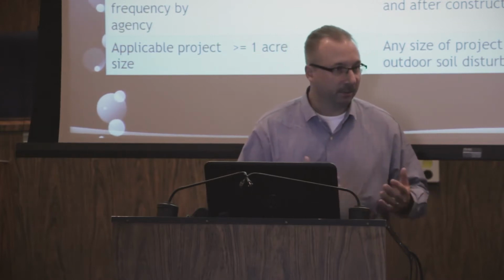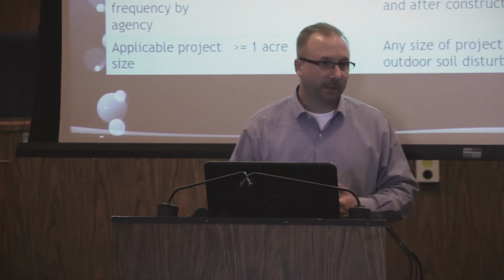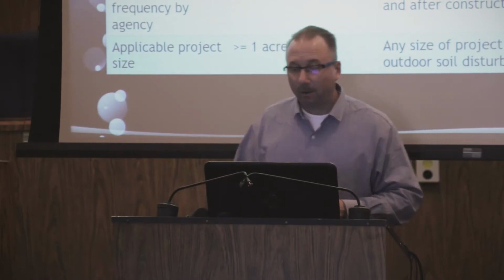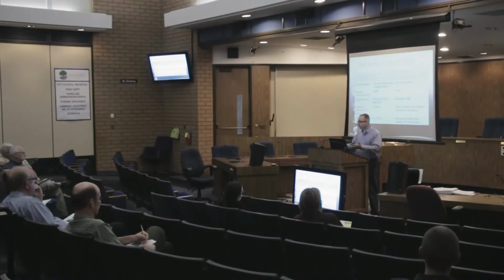I'm sure they have a method to how they approach the frequencies, but you as the discharger or as the construction proponent, you really never know when you might get inspected. However, with this municipal permit, your inspections now are going to be quite regular. In fact, the permit requires the municipality to do a before a construction project starts inspection, basically a meet and greet with the project proponent saying, okay, here's your erosion sediment control plan that you submitted, here's what you agreed to, this is what we expect to see happen at the site.